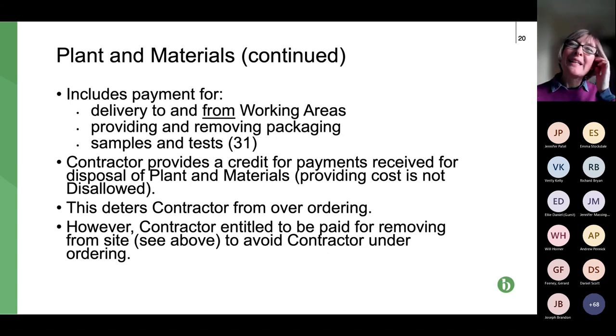So this is where it kind of brings home that it is quite detailed and quite specific what you can claim. And if you remember, that rule that if it's not covered in the schedule that you're using, the shorter schedule or the ordinary schedule, whichever's relevant, then it's deemed to be included within your fee. You need to be aware of what's covered, so that if you have an unusual project, you need to potentially amend to cover anything that is an unusual cost.